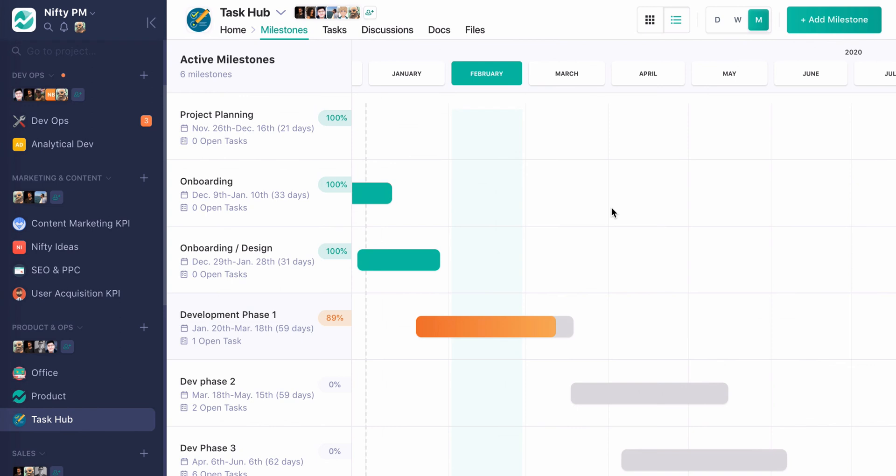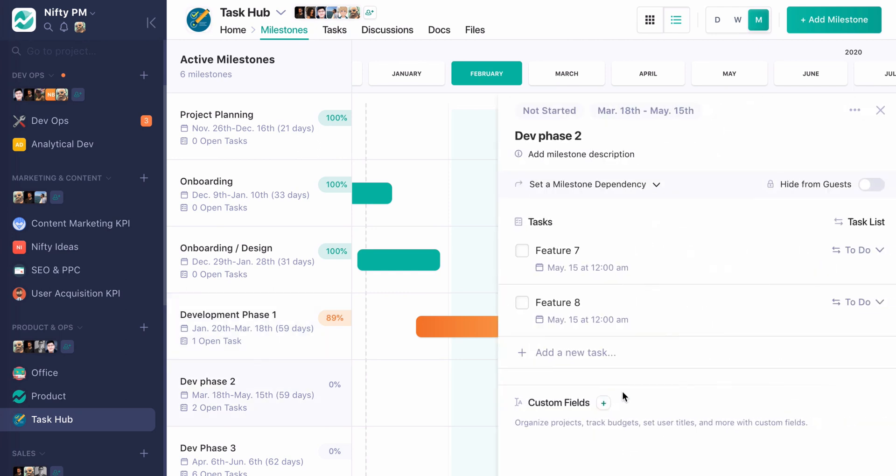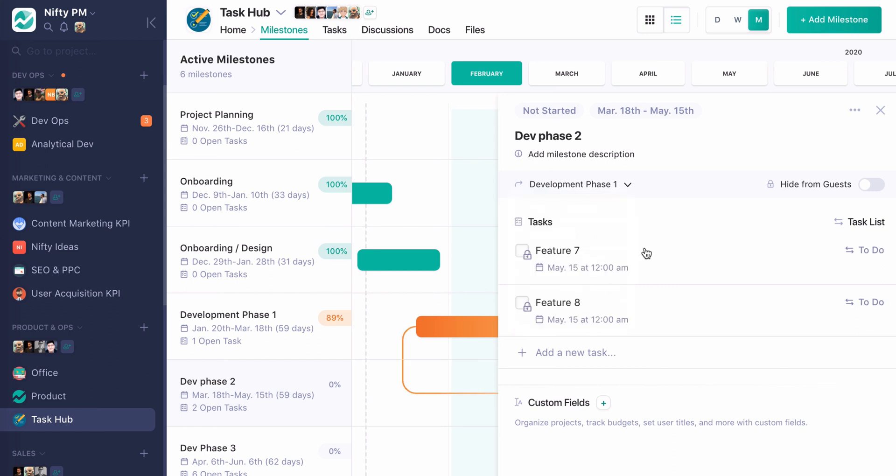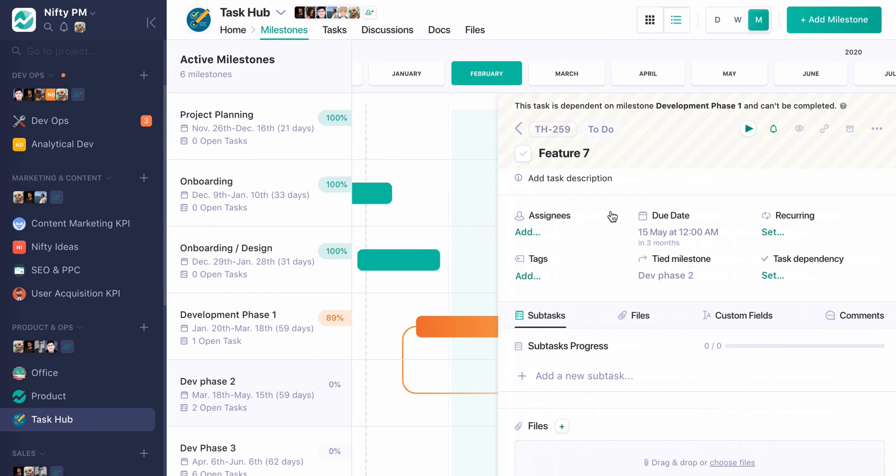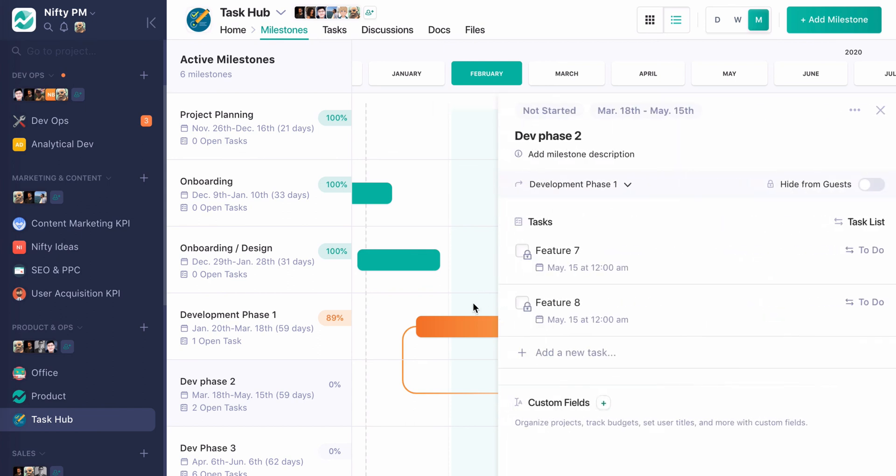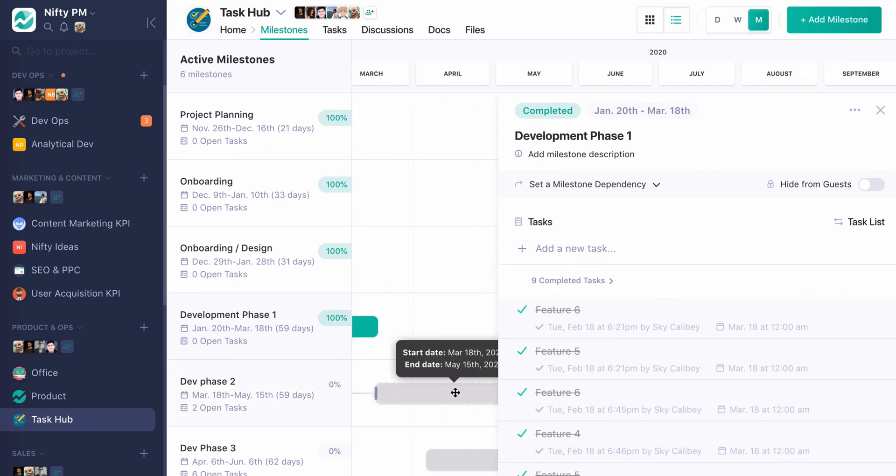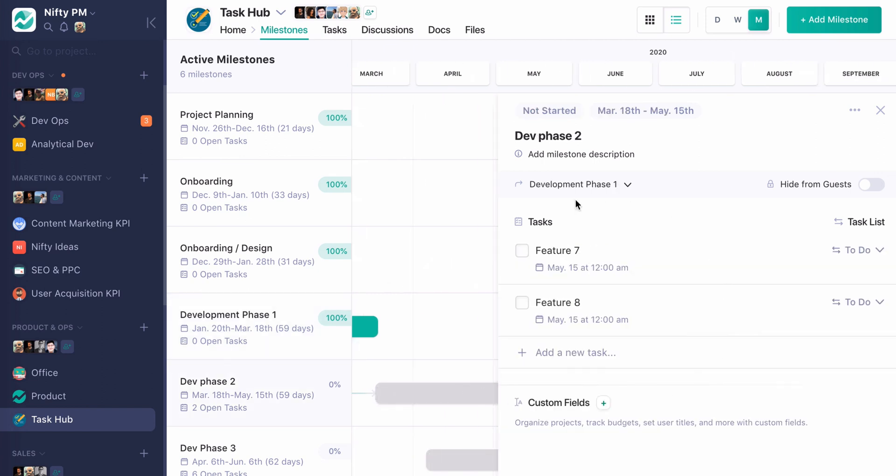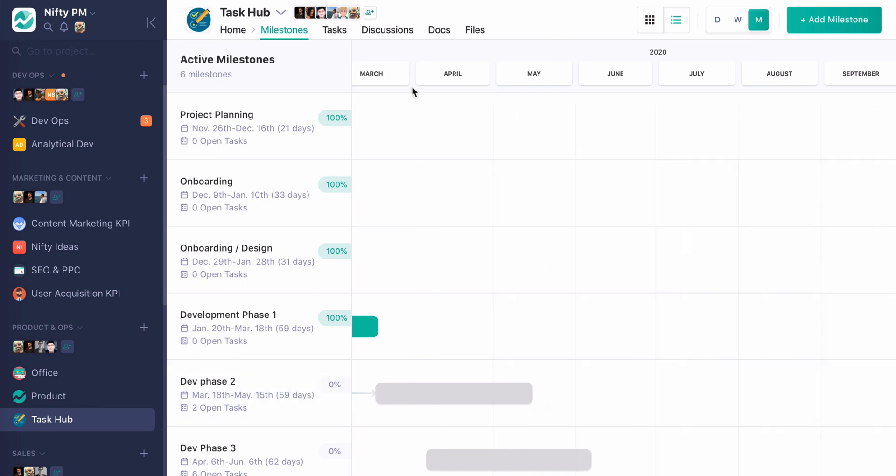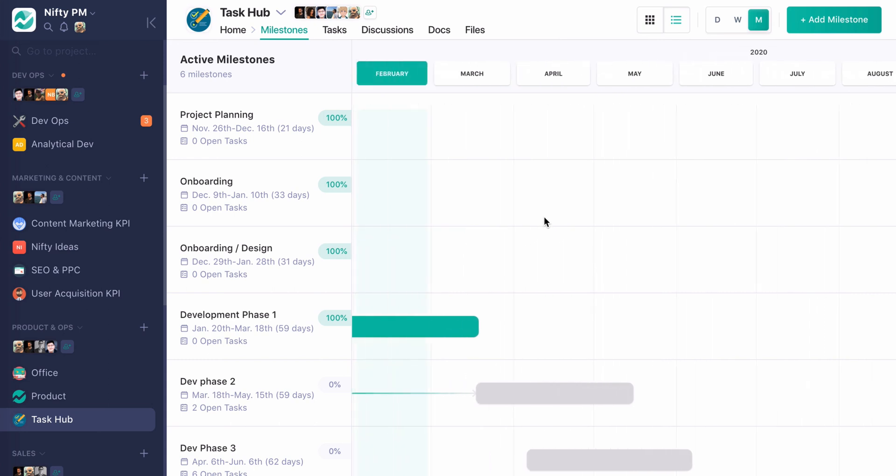Another thing I want to go over are dependencies in Nifty. We have two types of dependencies. We have task dependencies and we have milestone dependencies. I really like milestone dependencies because they're really block oriented. So for example, I'm going to go through and set this dependency for Dev Phase 2 on Development Phase 1. And you can see all of these tasks here locked. I can still go in and edit them, but I'm unable to complete them until all the tasks in the previous milestone are completed. So we can see that Nifty little arrow drop into place. I complete it. Now I go through and these are all unlocked. So again, this is a bulk way to lock tasks across Nifty. A good way to enforce kind of high level stages, especially with client approval. You can say, look, I can't move forward until we check this one off. What's your feedback on it? It's a good way to kind of chart overall progress.